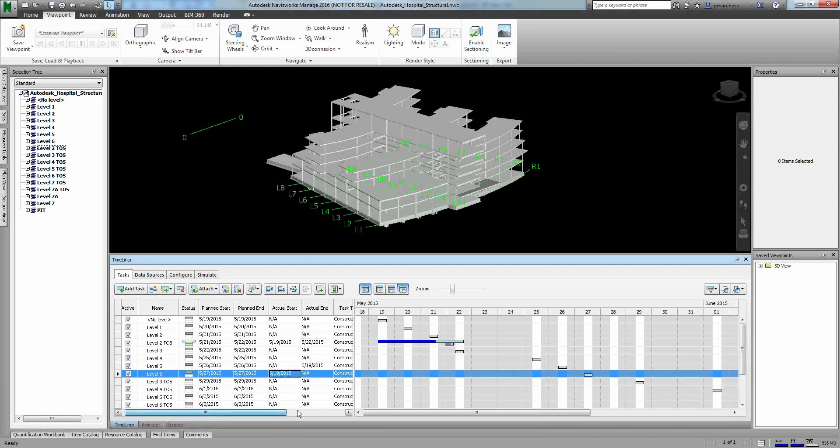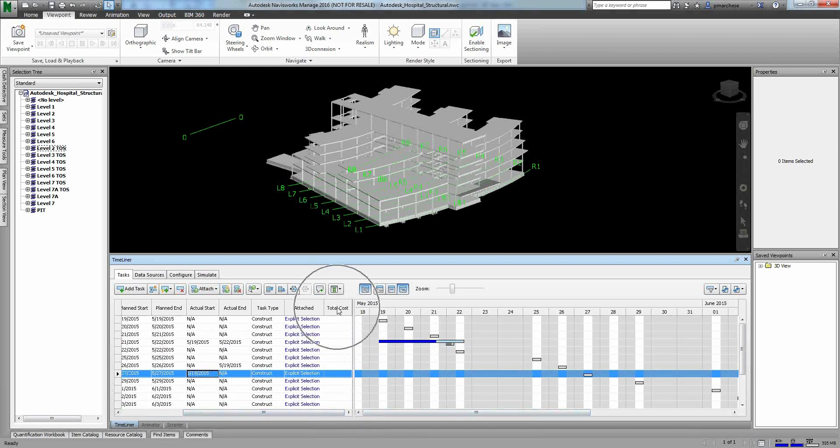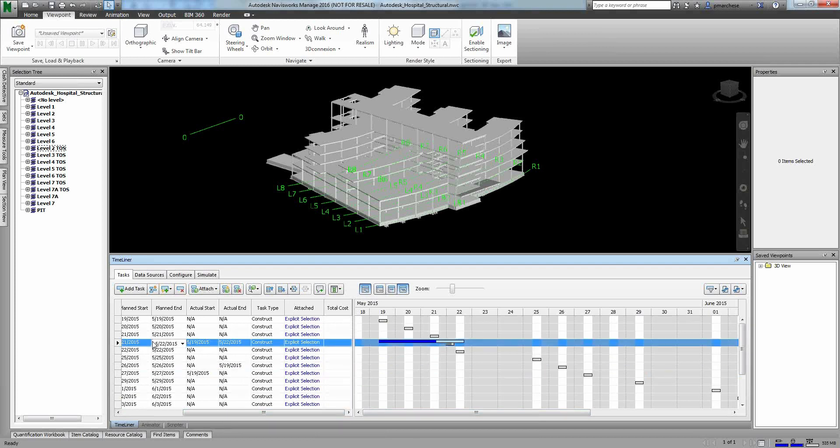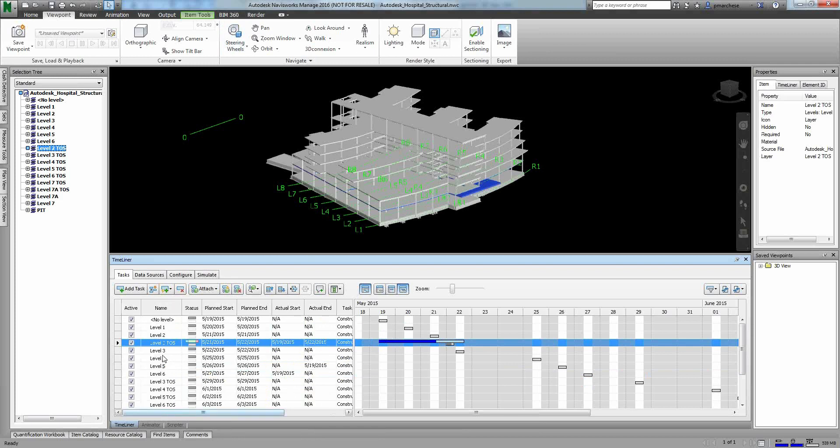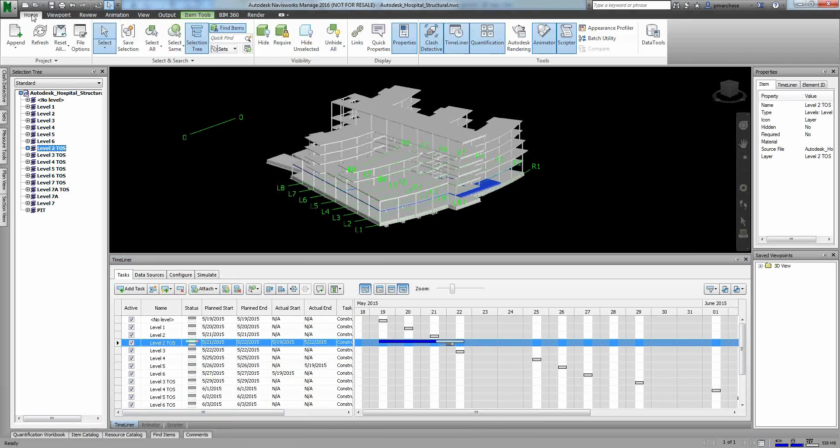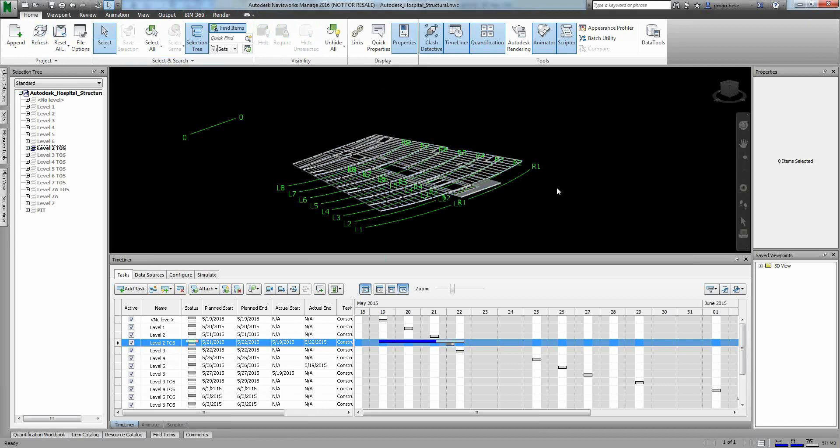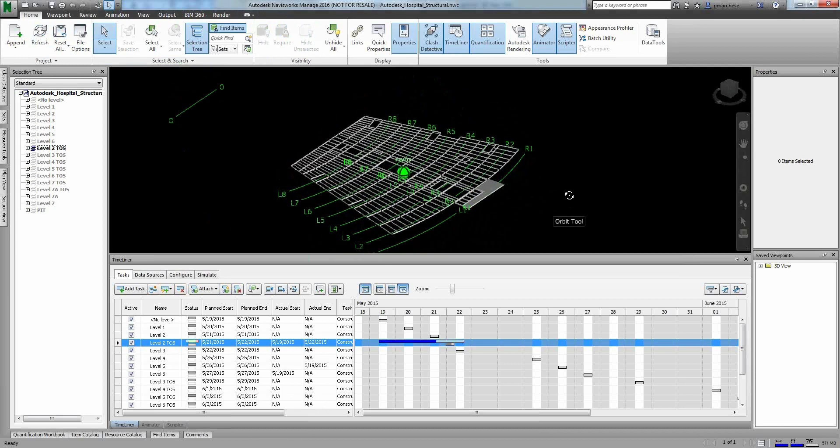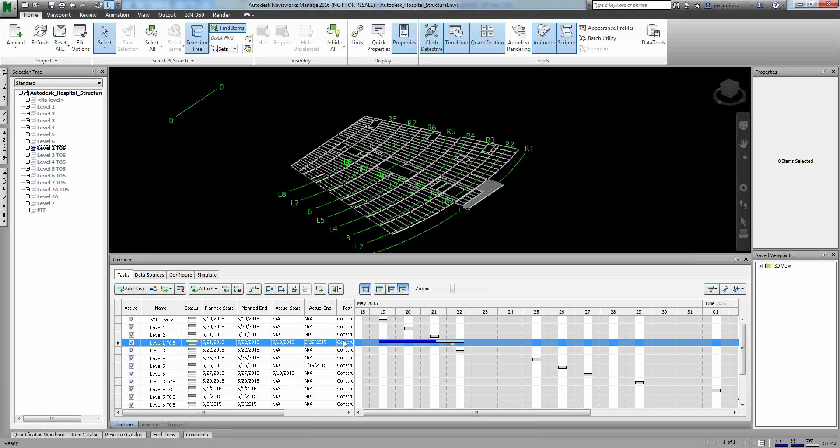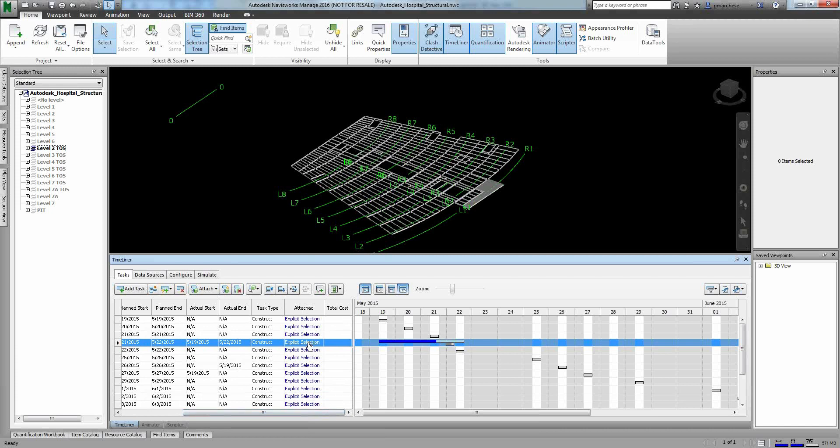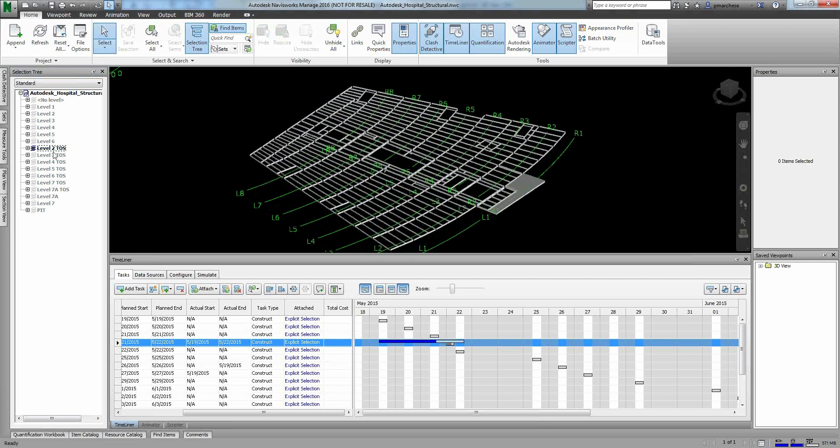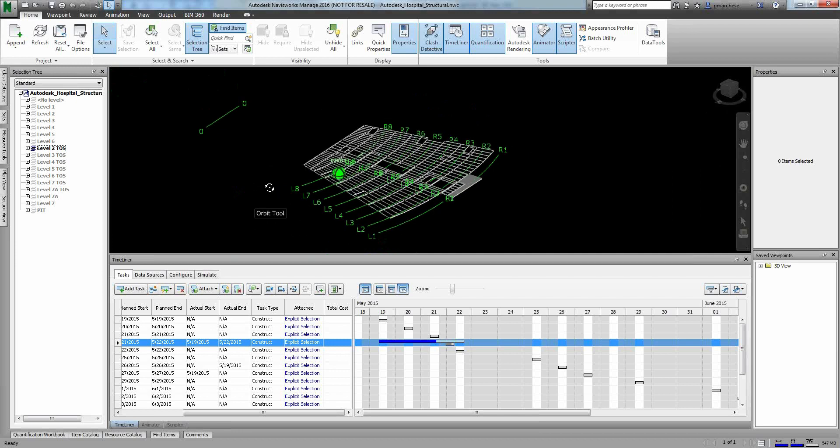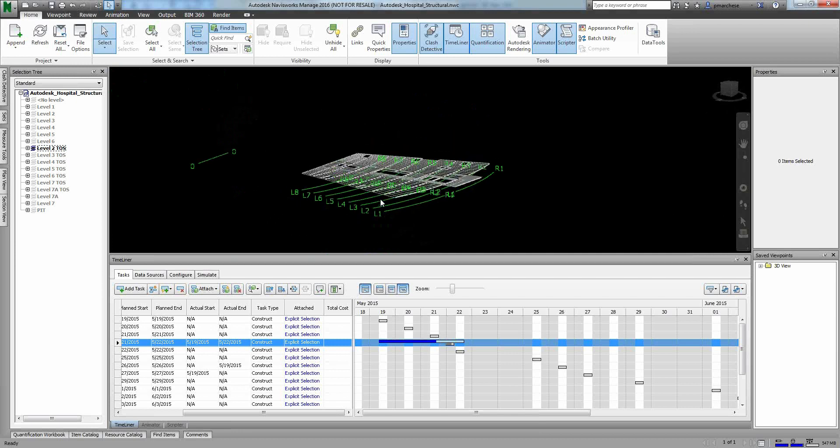Now from this, I can actually add more information, so I can put things like cost. But the main thing that I want to look at right now is the attached portion. That's actually how I determine what is going to happen during that timeframe. So in this case, when I click on that level, which is essentially my level two top of steel, what's happening is that all of this content here is explicitly attached to that level two top of steel. Now the good thing is all I have to do is set that and I'm done. The problem comes in when changes start to occur. If this says explicit, that means I've told it explicitly that that object now goes there. Now what happens if there's changes? What happens if things actually occur where they're on a different level but they're occurring in that same space? They have a different host or whatever.